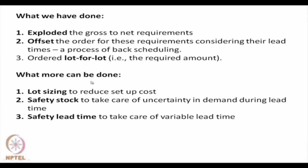However, one can also consider lot sizing the way we had been doing in the independent demand case. We can also consider safety stock and allow a little more than the expected lead time to be on the safer side. So these are various developments on basic material requirement planning.